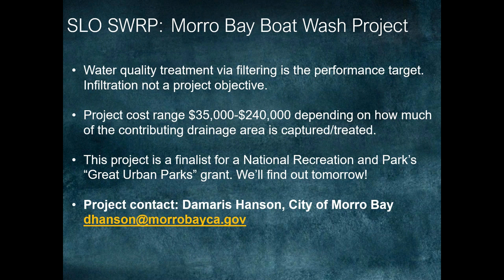And I also point this out because this project, going through conceptual design, identifying projects, having them on a list overall is really important. This grant opportunity came along. It was a very quick timeline to turn it around. If the city had not already identified this project, they probably wouldn't have been able to get it into this proposal process and potentially get funding for the project. So it's a really good thing to have gone through this planning process, get this project within the overall plan, and have it ready immediately to be funded with any opportunity that comes along.